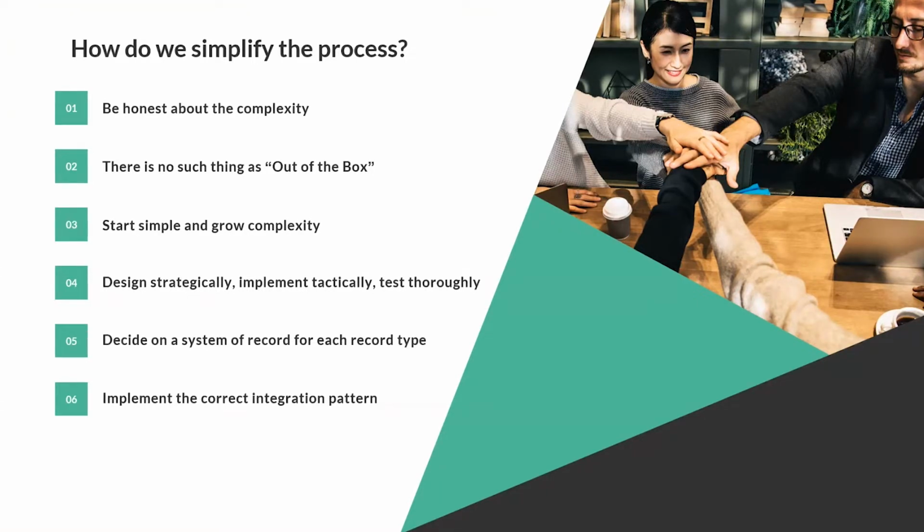So number 3, start simple and grow complexity. This is something that we do a lot of times with our data migration and data integration projects. Step 1, just get some data moving. Don't try to necessarily build the entire end-to-end integration or all of the different fields that you need to map and every transformation that you need to do. Start with the customer name. Start with the order ID. Start with something very, very simple and get that to work first.